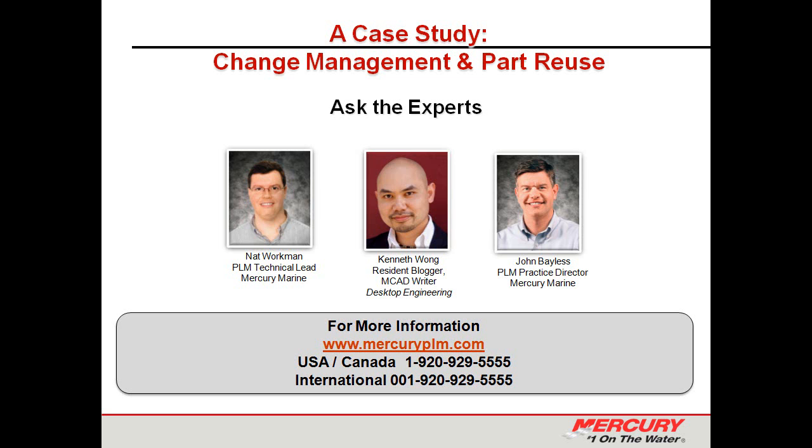Great. That was a great tee-up, because the question, John, is how often does the change board meet? When I was running my programs, we had a cadence where we met every week. So we had a scheduled time and place that didn't change. That way other managers could schedule around it, make sure that we meet consistently.